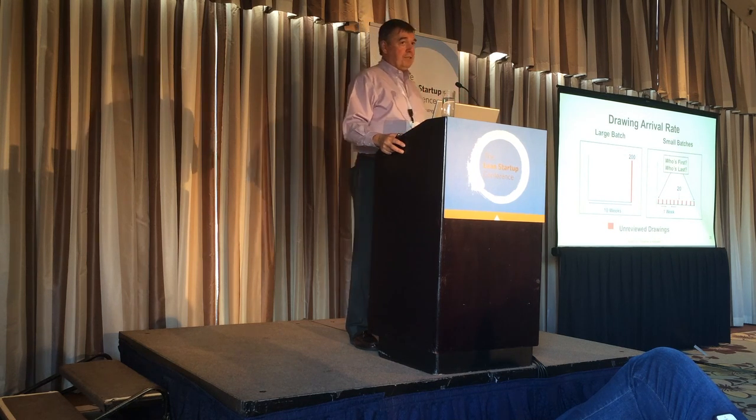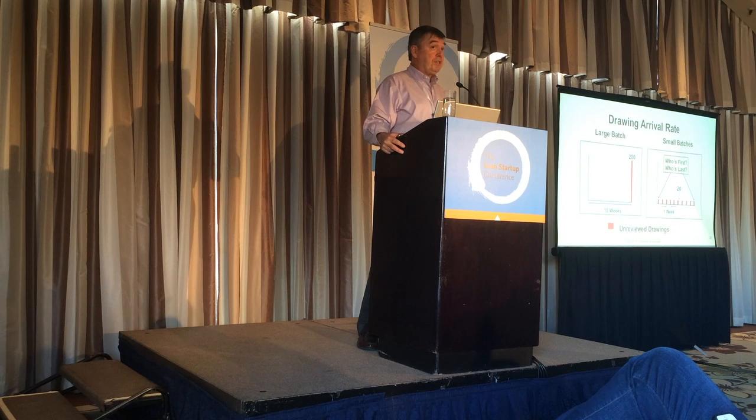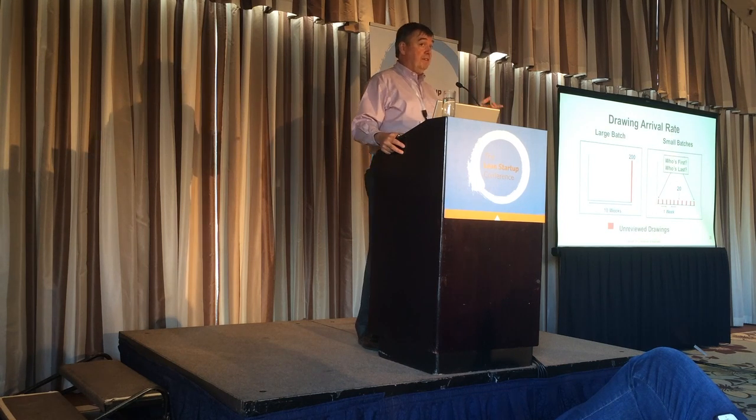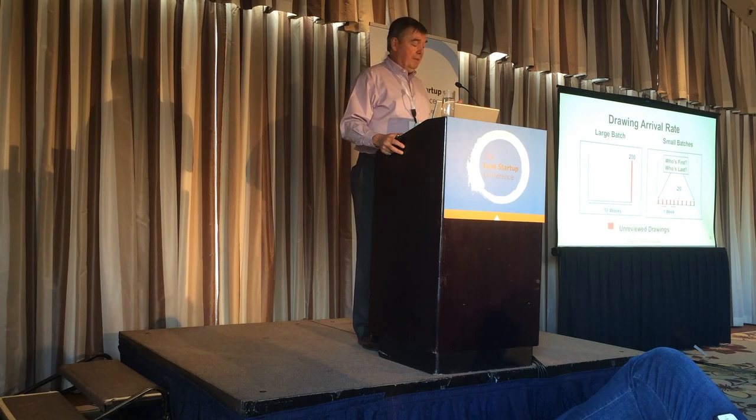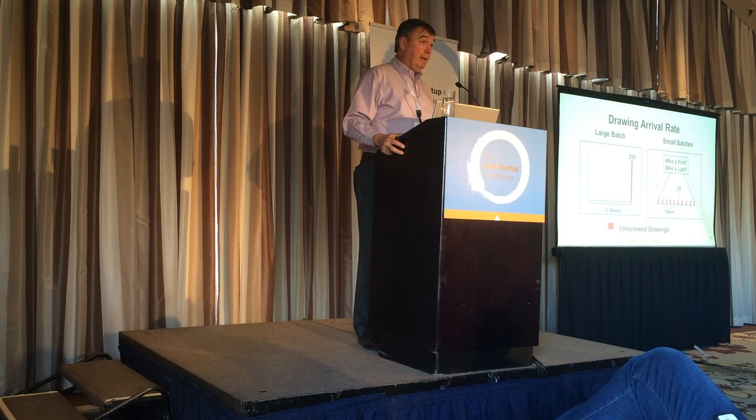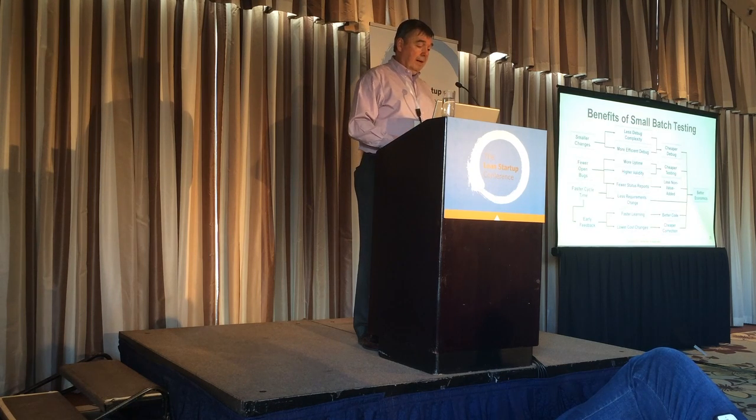Ones with highest cost delay, the ones with the highest risk in them, because you want to resolve as much uncertainty as possible, as Nat Milstein was talking about. Often things with the longest lead time, you want to get them into the process early so you have enough time to work through them. It is an opportunity that does not even exist if you are using large batch sizes in a process.